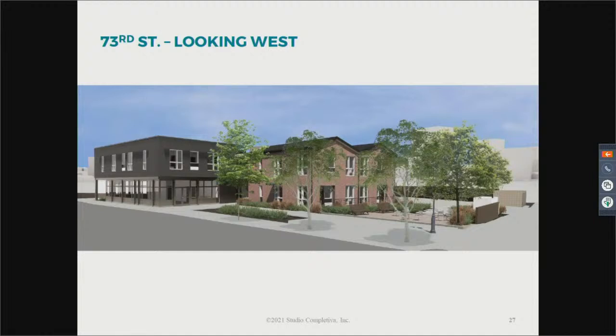So it's hard to project a move-in date at this time. Okay. And this is Young Cho, and I was just going to add that if we're able to break ground this year, sometime in the fall, potentially in the late fall, we don't really have a confirmation as to what the construction period may be, but we're anticipating that it's going to be less than a year, or around a year.